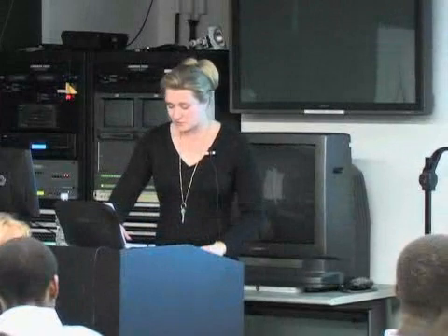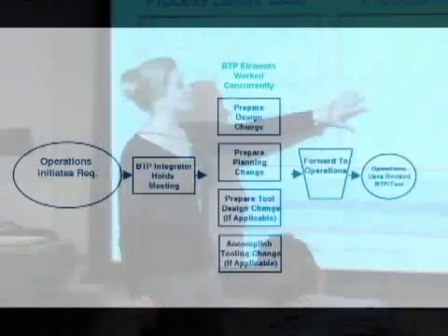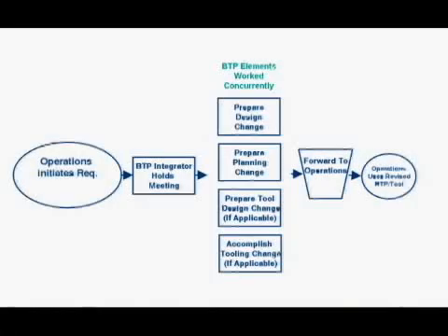So applying some of the tools of value stream mapping, the F-16 build-to package process was reduced down to something like this. So now we had single piece flow being able to go through the system. We had an allowance for parallel processing of tasks rather than single processing of tasks. Concurrent engineering principles were brought in to help achieve this kind of leanness in process, as well as co-location of all the various different units between design and manufacturing and quality that needed to be co-located to accomplish this.